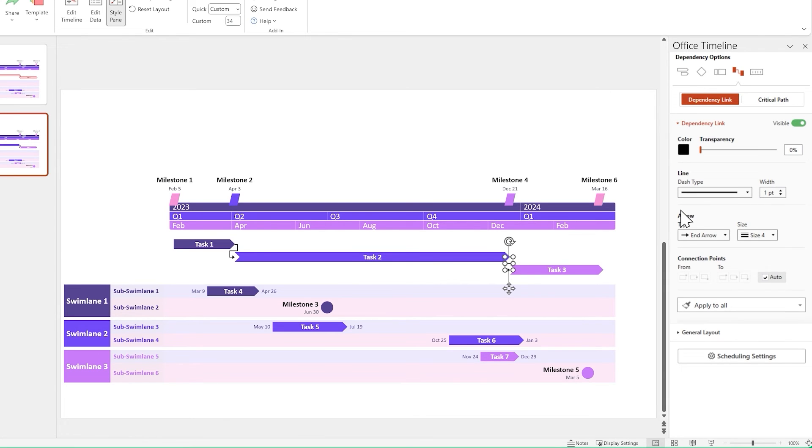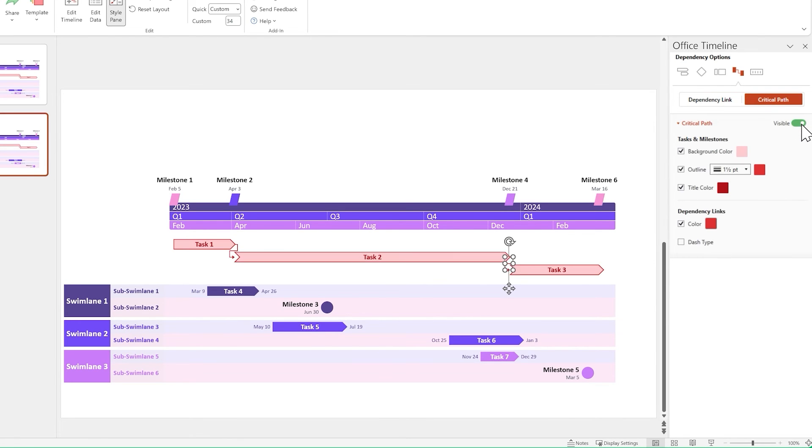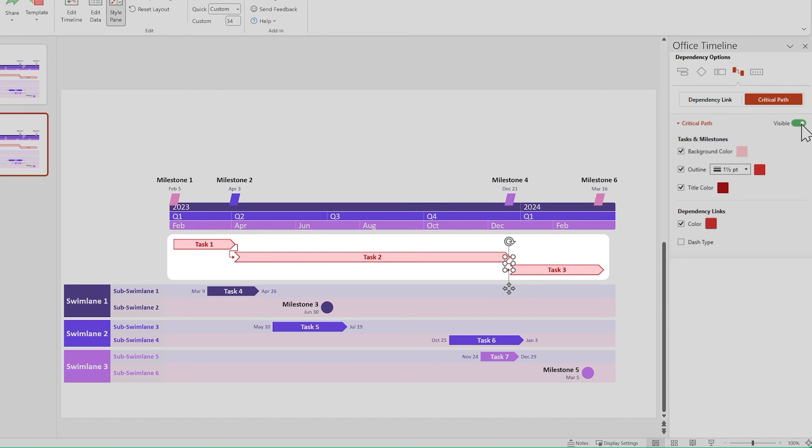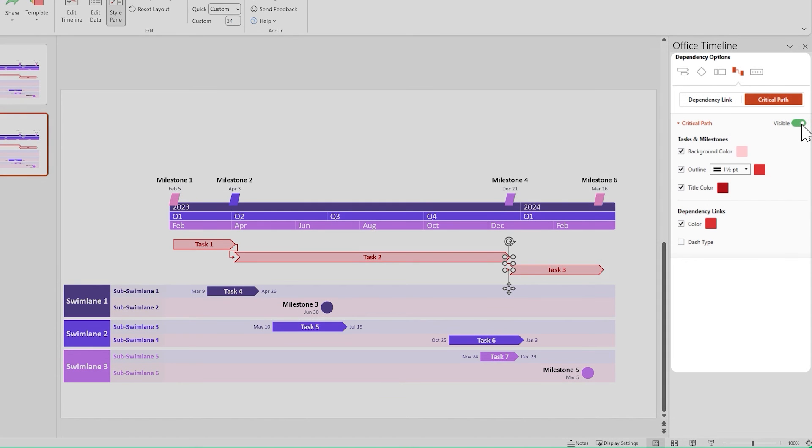Now go to the style pane and switch over from dependency link to critical path, then turn the toggle from hidden to visible. You should see the critical path highlighting the chain of linked dependencies going up to your latest scheduled item. And if you want to customize the way it looks, you can do so from the style pane.